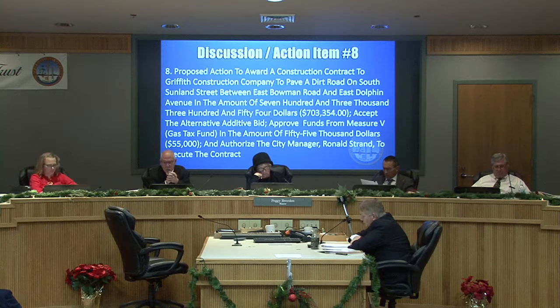Resolution 1720 awarded the planning and design and construction management portion of the project to Quadnoff and set aside $148,660 for the contract. This resolution was approved by a unanimous vote of the previous board to this one. With Resolution 1728, Council approved the program supplement agreement, again in a unanimous vote of this previous Council. When Council approves a program supplement, this is when we enter into a binding contract with the federal, state, and in this case, county governments.